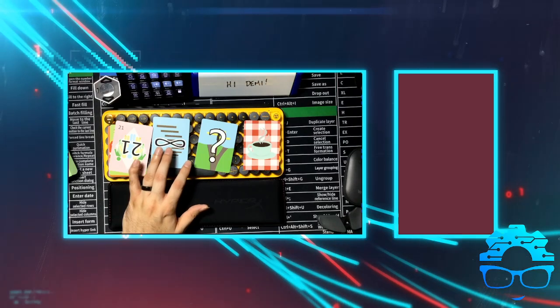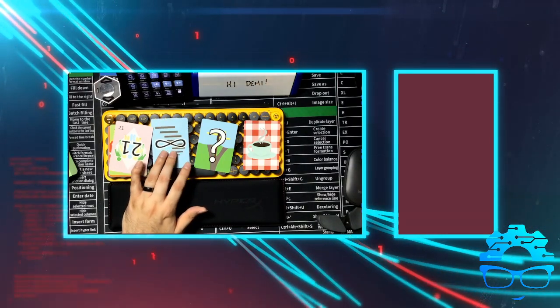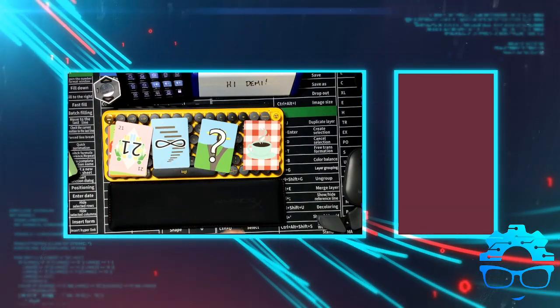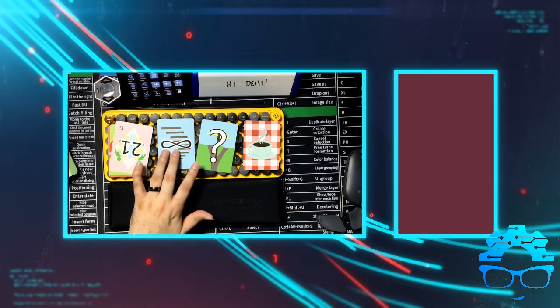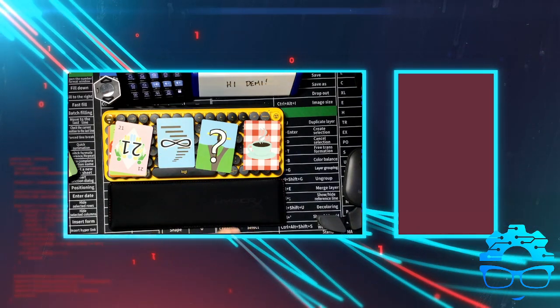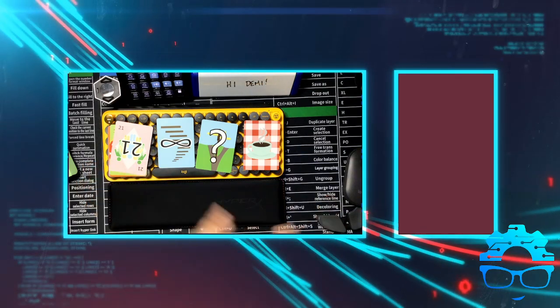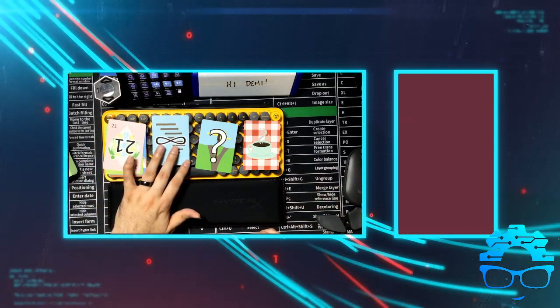If you need to call out for help, whip out your infinity card. That just tells me there's no way this task is going to get done. I don't even know the technology we're trying to use for it, or it's just a huge burden. It's just too much for us. That's when I tell folks to pull out the infinity card.